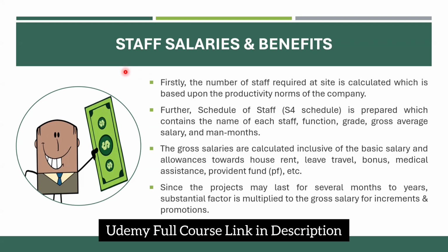So how do you calculate the staff salaries and benefits? We'll understand it theoretically first, then we will also move to the Excel sheet and see one case study or practical example from one construction project to see how we can calculate the staff salaries and benefits. So first of all, the number of staff required at site is calculated, which is based upon the productivity norms of the company.